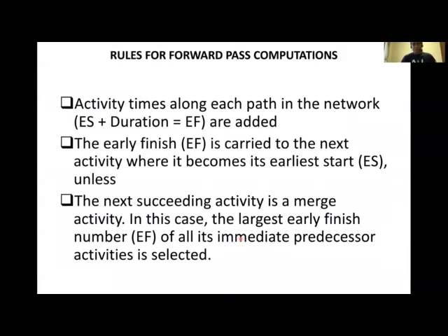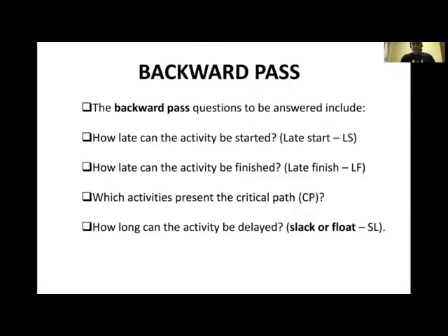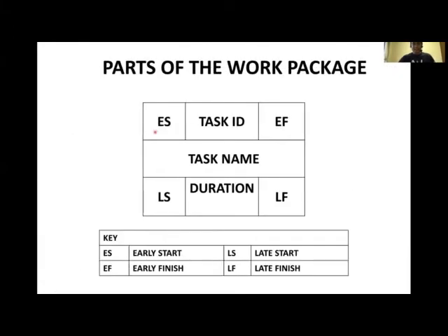All right. So now, having this, let's see how we can handle the forward pass. How do you do the forward pass? First of all, you need to know how to do the early finish. The early finish is dependent on the early start plus the duration. If you remember, we divided the work package as follows, okay? The early start and the early finish and the duration.